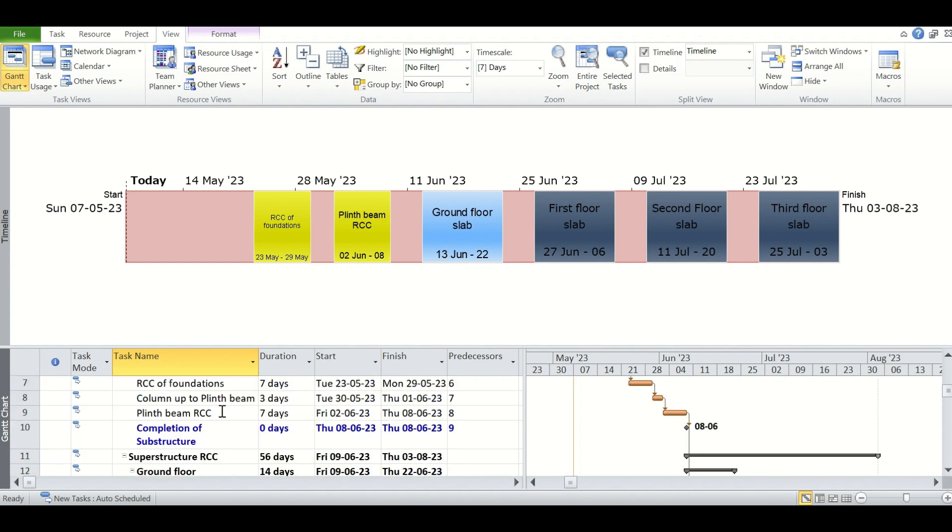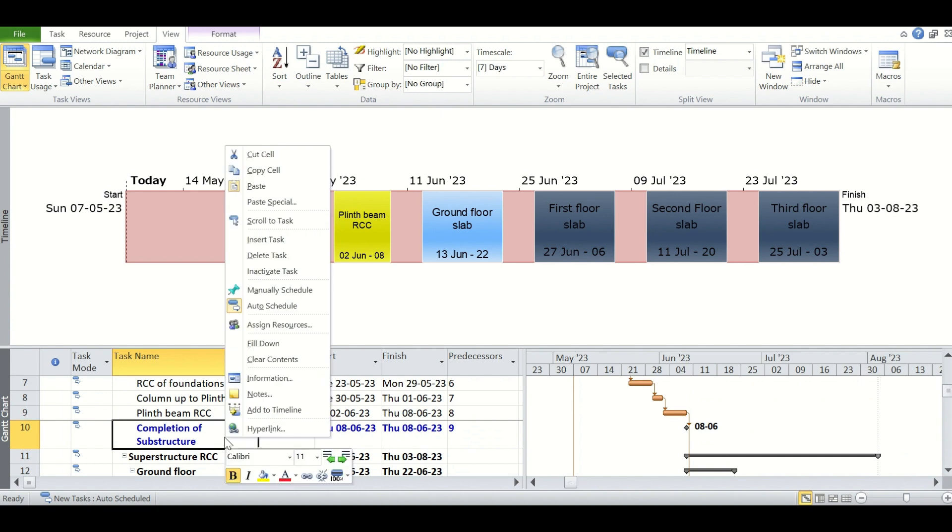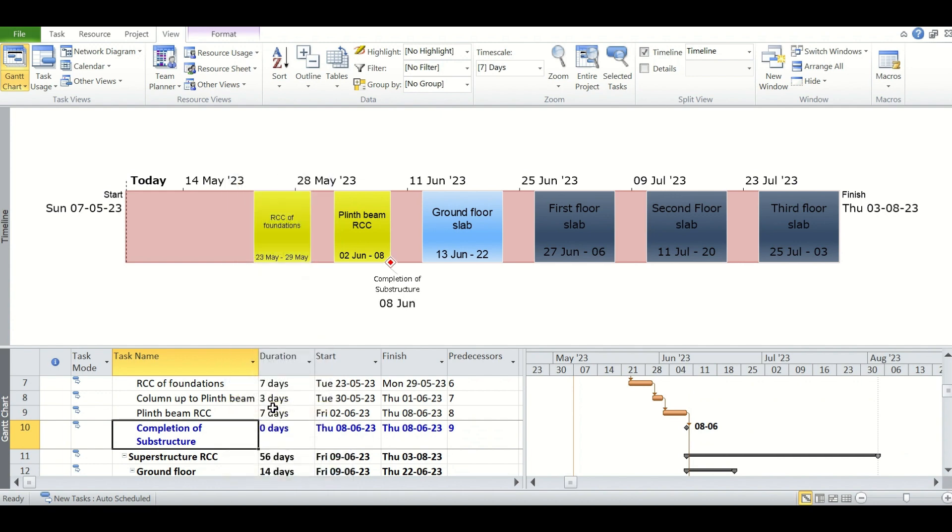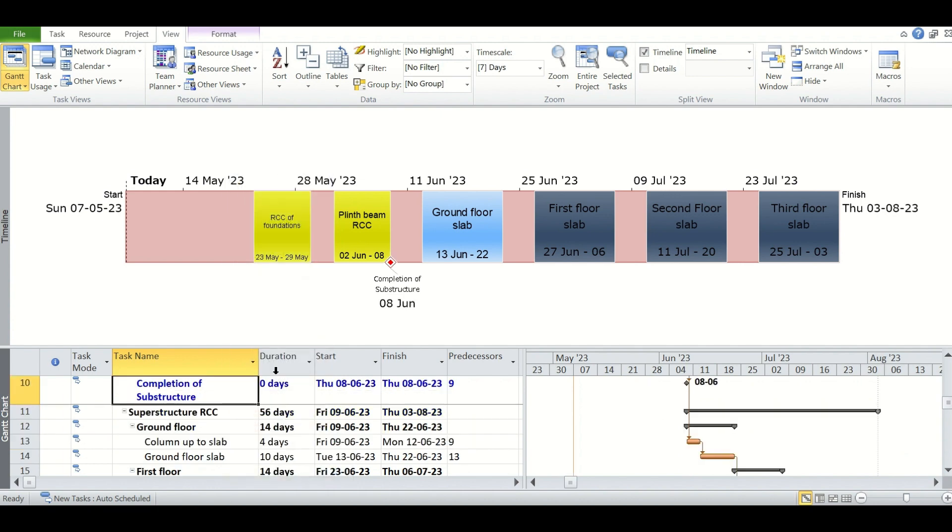So the same way we have added the tasks to the timeline, we can add the milestones to the timeline as well. We will right-click on the milestone and then click on add to timeline. So you see here the completion of the substructure milestone has been added with a different symbol.